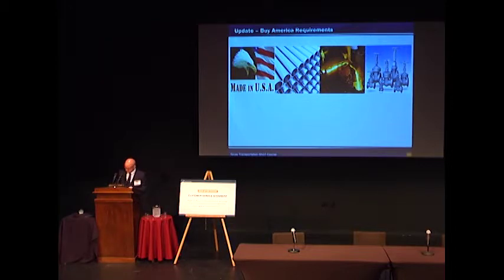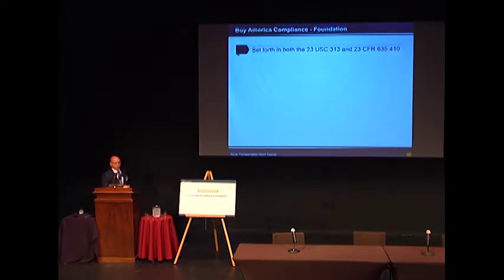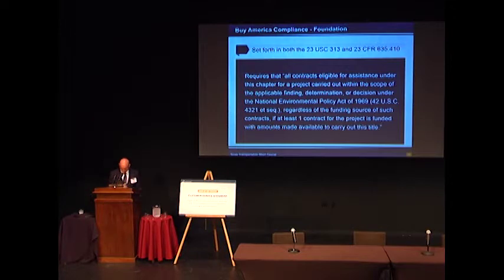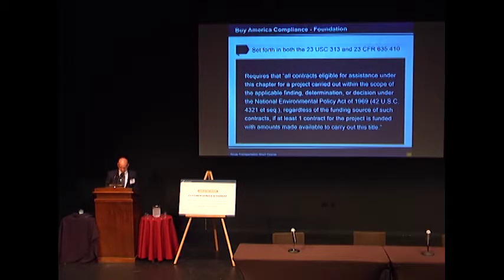Buy America is set forth in the USC and the CFRs 23-313 and 23-635-410 respectively, requiring that all contracts eligible for assistance under the chapter for a project carried out within the scope of the applicable NEPA finding, determination, and decision — regardless of the funding source — comply if at least one contract for the project is funded with federal amounts. In short, if federal money is involved in the procurement of iron and steel, this legislation governs it. We have detailed these items in our right-of-way manual under Chapter 3, Section 2, accessible both internal and external to TxDOT.